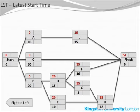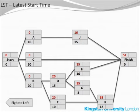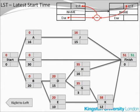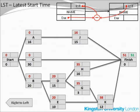Let's move on to the latest start time, LST — not LSD. LST is the latest time in which you can start any activity so as not to cause the entire project to delay. This calculation starts at the finish node and then is developed from right to left until the start node. With the finish node, the latest start time is the same value as the earliest start time. For any other activity, take the LST of the next activity and subtract the duration of the current activity to get its latest start time. The finish node's latest start time is 51, and the duration of activity J is 15.